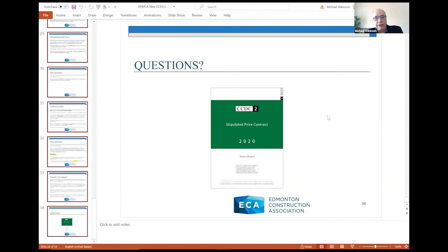Remember, at substantial performance of work, it might only be 97% or 98% of the actual contract completed. There may be another 3% to be done. My understanding in those circumstances is as legislation in some provinces, I'm not sure about Alberta, but I know in Ontario, for example, a further finishing holdback is required. So you could still lien based on those amounts not being paid. But by the 29th or 30th day, if you've still got amounts outstanding, your lien rights would still apply with respect to any new work being done under that project to finish the 2 or 3%. But that's a lien question. Really, it has nothing to do with CCDC-2.